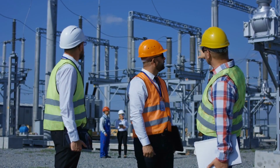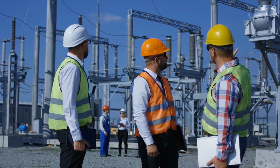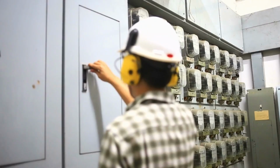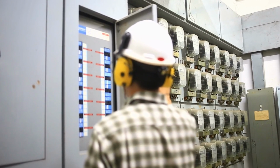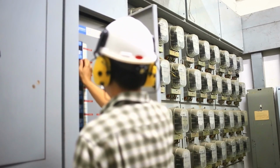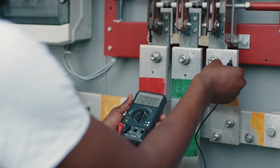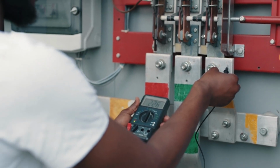They are the group responsible to commission and start up the systems, which can typically only be done in a specific order. While the construction team may have determined that their construction sequence was optimized by completing installation of the 230 kV AC breakers first, followed by the AC control building, this is not much help if the AC control building is the first in the startup sequence prior to energization of the 230 kV breakers. The commissioning sequence is stalled because of this out-of-sequence construction.